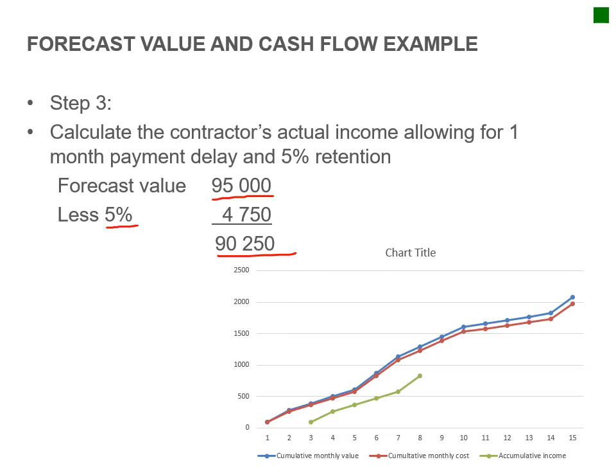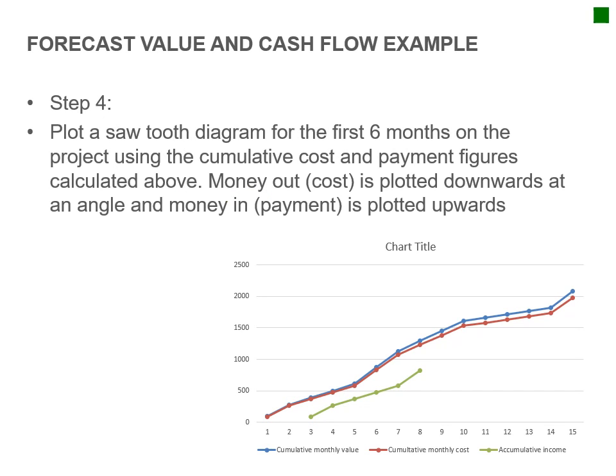Okay, per month. So this is now for the income that we're calculating. We've got 90,000 as our actual income, which you put in at the end of the first month, and then you only receive your payment after the second month. Okay, so this is your cash flow inflow, and this is that 90,000 that's projected there. Okay, so that's more or less how it works.